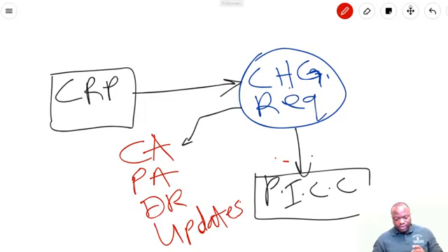Going a step further, it says, when required, the Perform Integrated Change Control process includes a change control board. When required, not every time, see, which is a formally chartered group responsible for reviewing, evaluating, approving, deferring, or rejecting changes to the project and for recording and communicating such decisions. Approved change requests can require new or revised cost estimates, and so on.